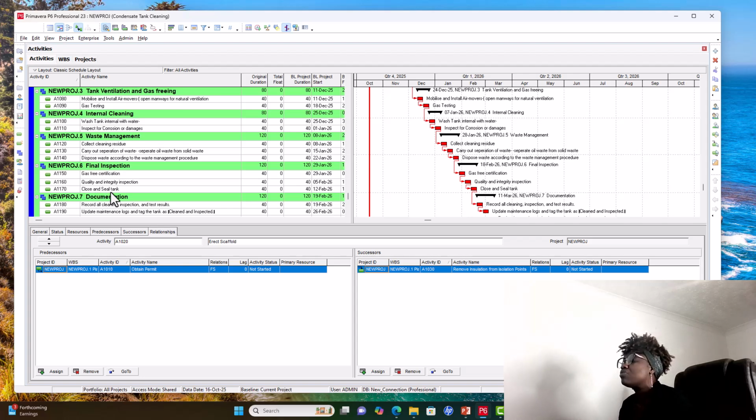So after checking for the quality of the tank, of course, instrument will check, mechanical will check, then fabric will check. It depends on the way the organization is set up. You see some organizations where just one mechanical is in charge of everything, but you also see some organizations that have different participants within that space for greater value. Whichever way, inspection will need to happen. Then after which you close the mouth, you close the tank completely.